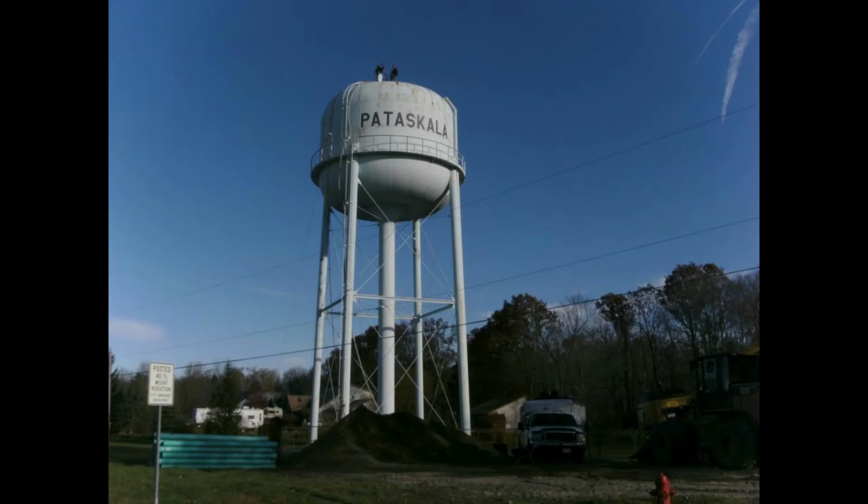Now the neighborhoods, the newer stuff, we have material specifications, we have plans that identify the lines as either plastic or copper. So that's pretty easy, but in Old Town, we do not. I have not come across lead service lines, but this will verify to the EPA and meet the requirements of it. Because we didn't know about this grant or the requirement, there is an amendment to the supplemental that would account for this $50,000 grant. So that will be on the agenda for the next one.